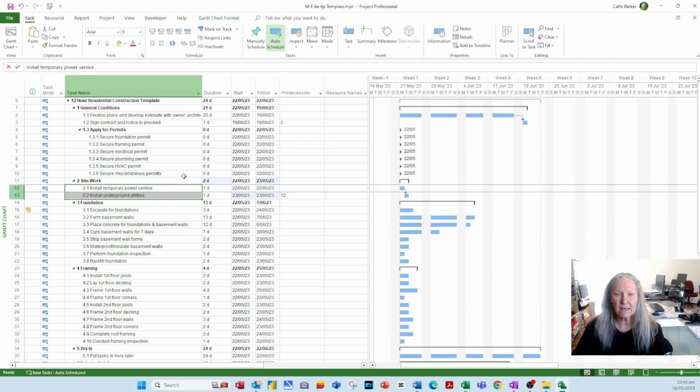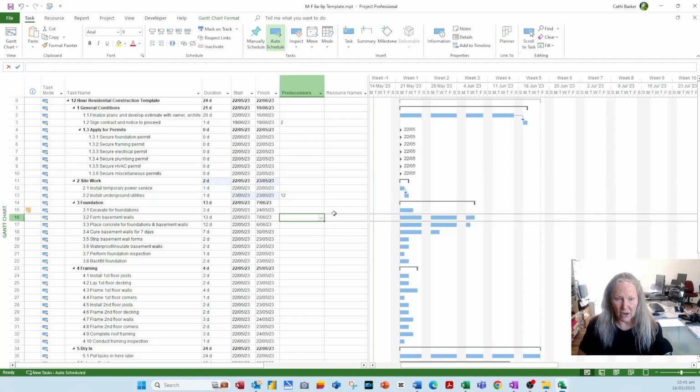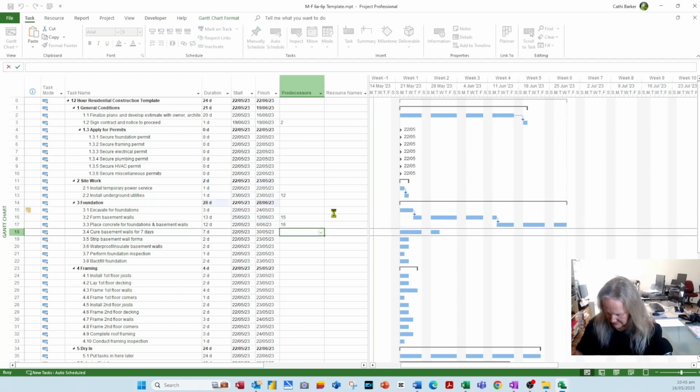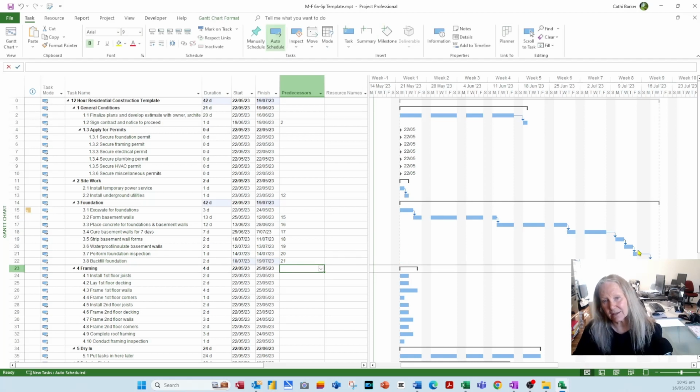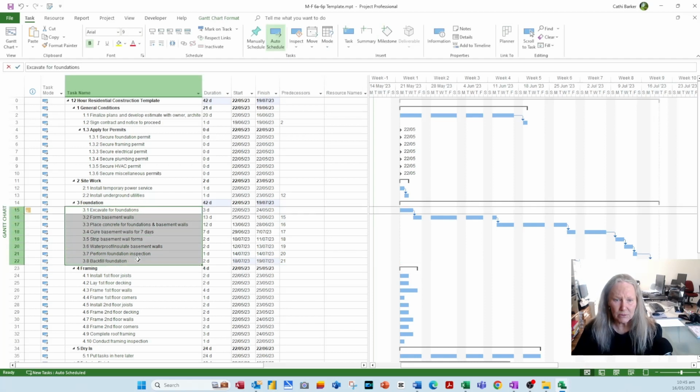I could break that link just by hitting this button here. Control Shift F2 is the shortcut key. That breaks the link, and that recreates the link. Or you could actually just go through typing. So this is linked to 15, 16, 17, 18, 19 and 20 and 21. And I've immediately created links. Or select them all and break the link, or create the link. Really easy to create links.